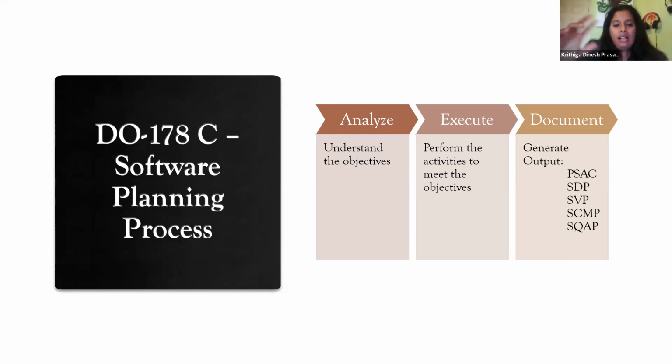The next thing in any DO-178C process area is the activities, and specifically for any effective planning, an activity is a determination of how we are going to perform it. The first is we have to identify the software plan, provide direction to the people working in the software project, and then we have to know what our standards are, and what methods and tools we are choosing for that particular project.